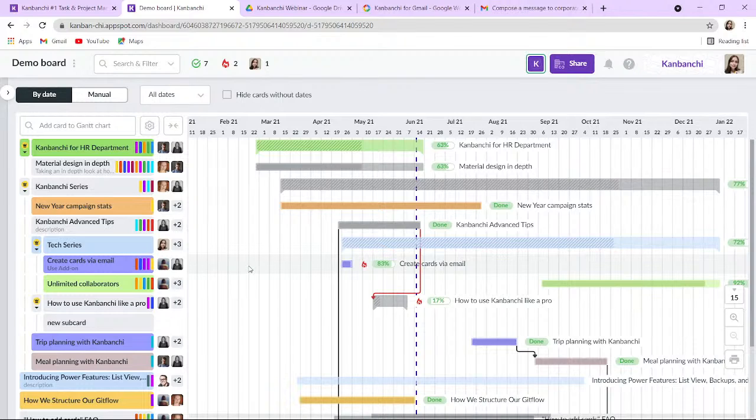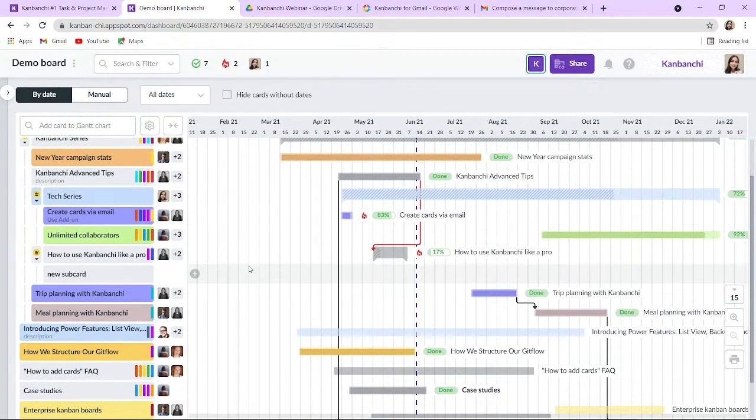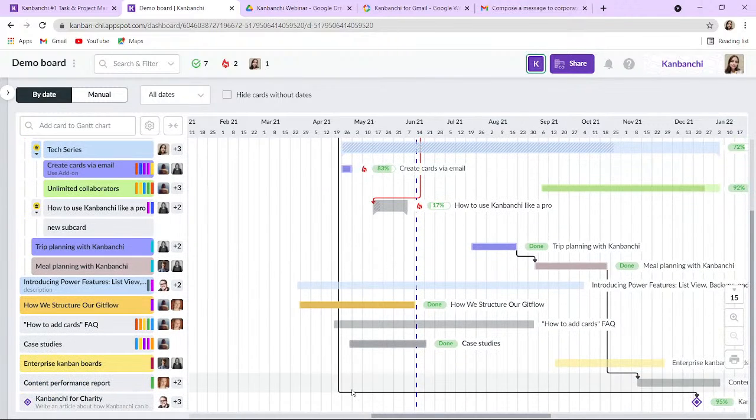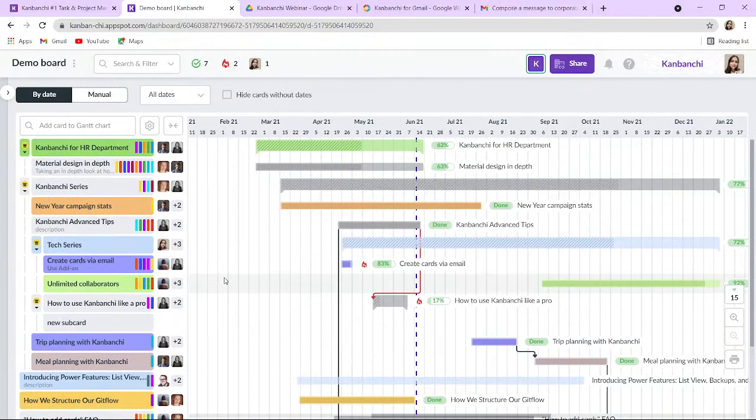Also, you may observe task dependencies, meaning that you may add a predecessor or a successor to your task. This feature helps to keep task implementation sequence under control. Task dependencies are shown in arrows in the Gantt chart. If the dependency is normal and it is not violated, it is shown in black, like this. In case your dependency is violated and something has gone wrong, the dependency will be shown in red.